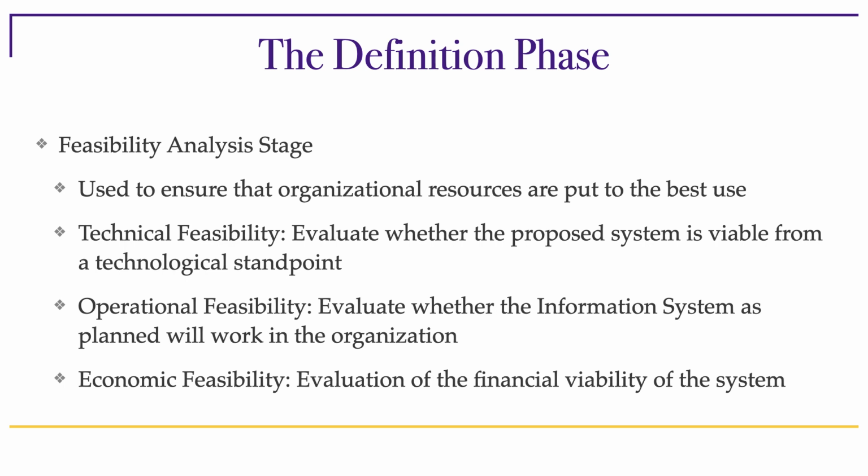Operational feasibility goes from IT to IS, from information technology to information system. So at this stage, you will have to assume that technology can be built. And now you're wondering or analyzing whether it is feasible to assume that once that technology is brought into your organization, the information system that needs to be built around it will actually work. So can processes be redesigned appropriately? Do we have the right people to embrace this technology? What kind of change management would be needed, and is it going to be successful?